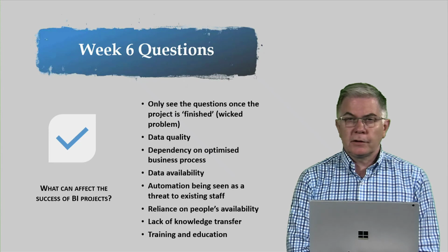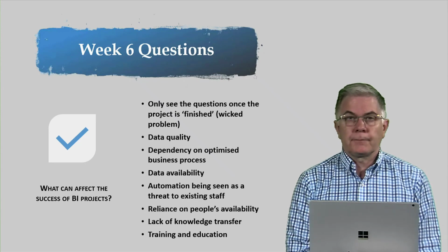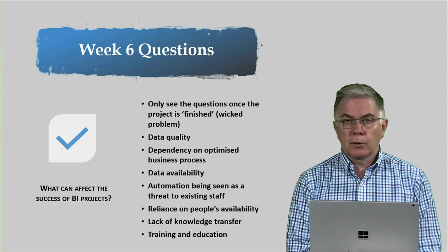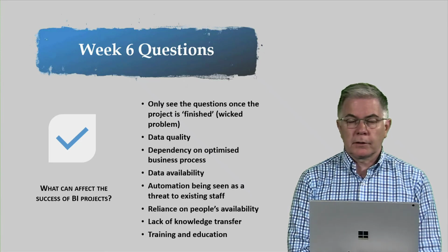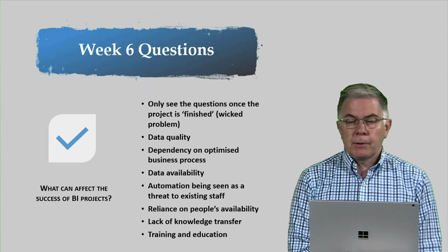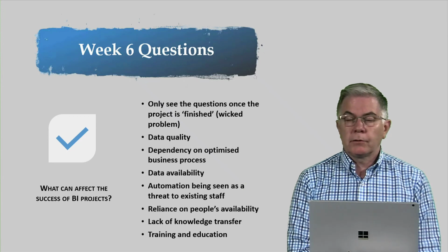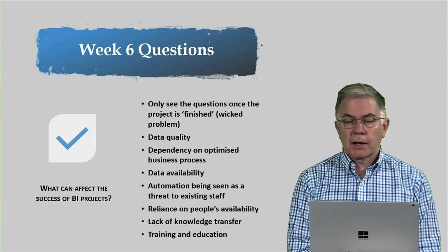And finally, all that data isn't of much use unless you've actually got training and education. That should be a significant investment in any project, because if you're going to develop reports and dashboards or embedded analytics or automation or make use of big data and people actually aren't going to make use of it, it's all been a bit of a waste of time. So anticipate that early on and make sure that gets put into the project plan and budget.